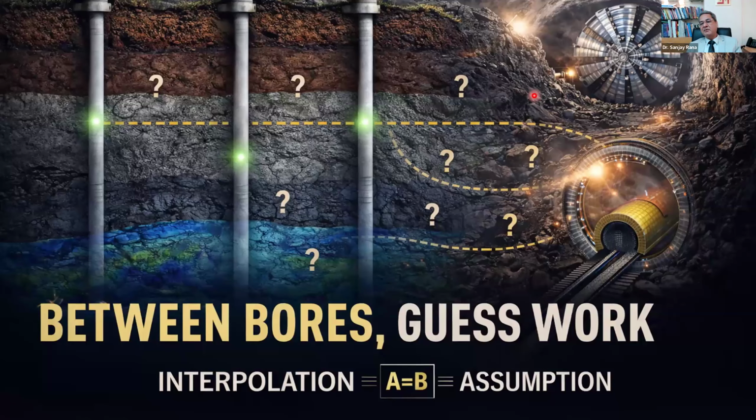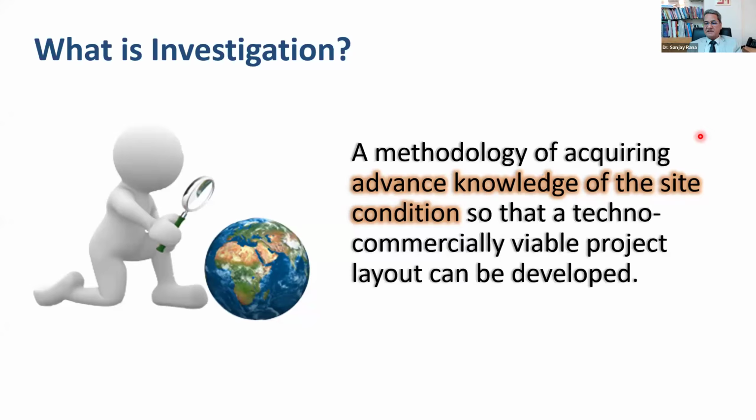So when we talk about investigation, investigation can be defined as a methodology of acquiring advanced knowledge of the site conditions so that a techno-commercially viable project layout can be developed. That is what investigation is. It also has been proven around the world, not only in India, that quality of investigation, quantity of investigation, and time allowed for investigation means less uncertainties and less cost and claims.